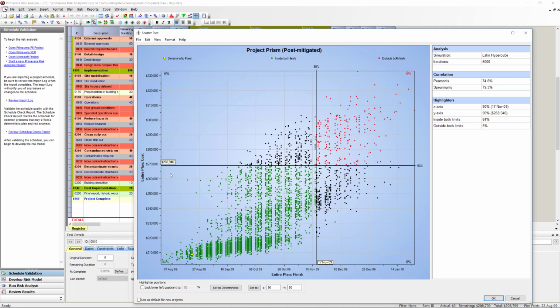It is just foolish. It is very, very foolish for our project manager to sign a contract like this without performing a risk analysis. Because just for us to have a level of confidence of 90% of meeting the cost, we are already saying that we have a cost overrun of almost 50,000.